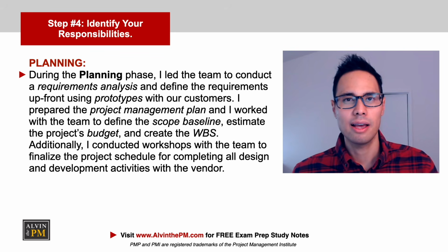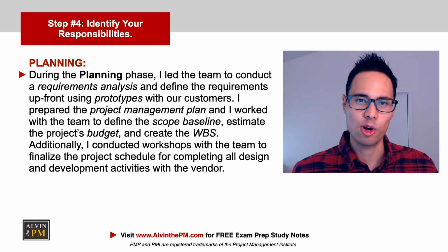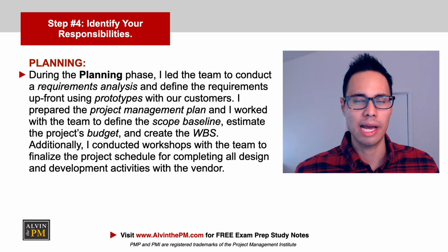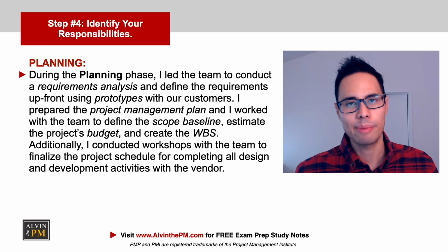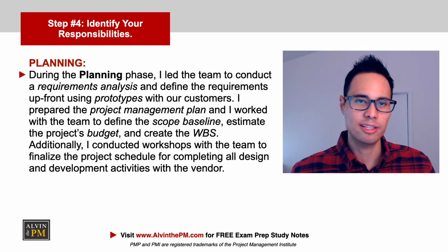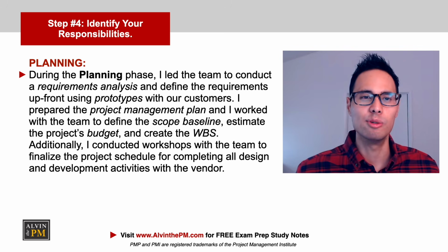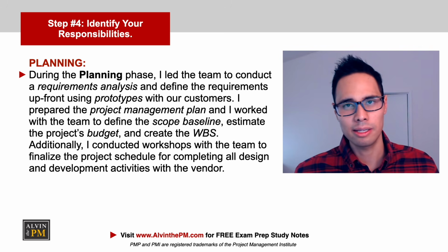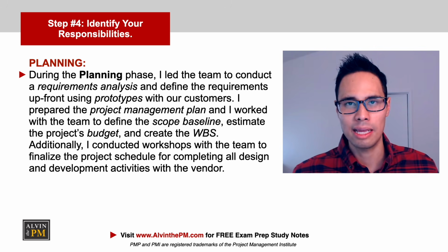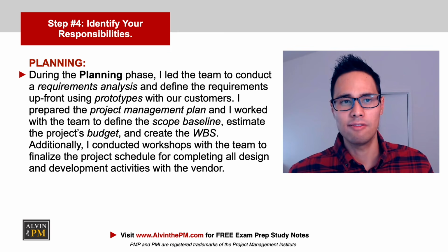Now on to the next phase for planning. During the planning phase, I led the team to conduct a requirements analysis and define the requirements up front using prototypes with our customers. I prepared the project management plan, and I worked with the team to define the scope baseline, estimate the project's budget, and create the WBS. Additionally, I conducted workshops with the team to finalize the project schedule for completing all design and development activities with the vendor.